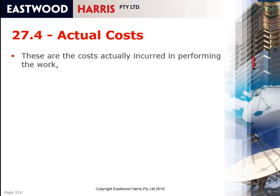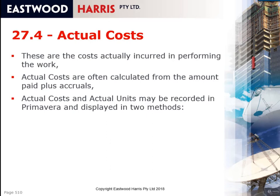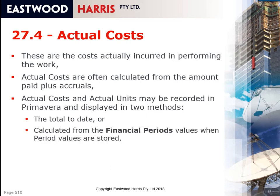The actual costs are the costs actually incurred in performing the work. If you were to stop the work at this point in time and pay everybody for the amount of work completed, that would be the actual cost — effectively the amount of money spent in your accounting system plus accruals. In P6 there are two methods to display actual cost: total to date, where actual costs are distributed evenly over time from when the first cost was expended, or using financial periods, which shows how much was spent in each month.